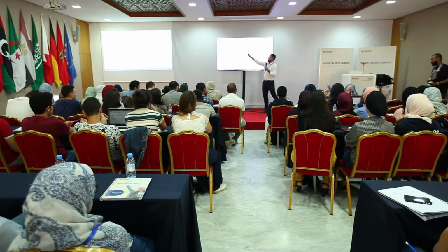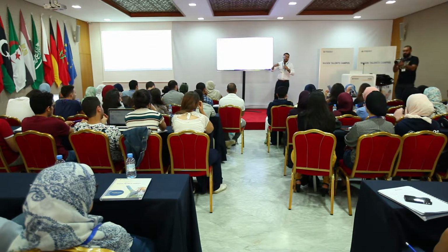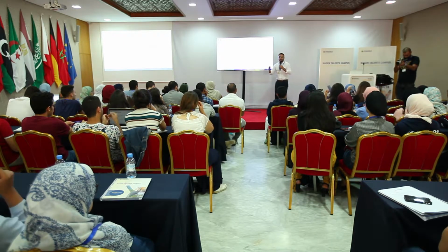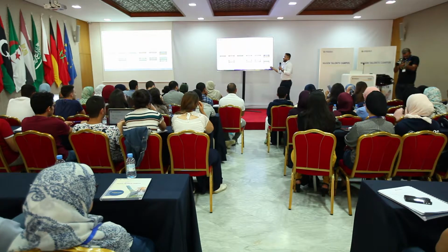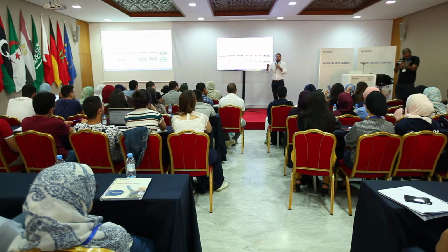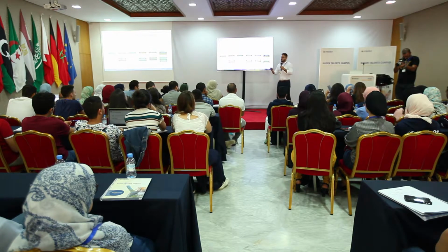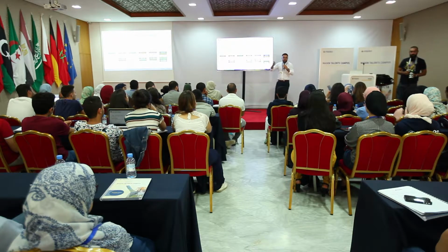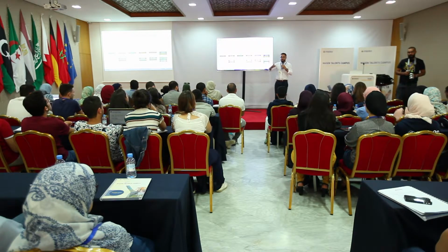So designing a plant is a complex process. What I want you to keep is this: the level of detail required depends on where you are in the phase of the plant. Is it at the very beginning, pre-feasibility? Do you want to spend 4 months doing this process if you're not even sure you're going to get anything back from it?